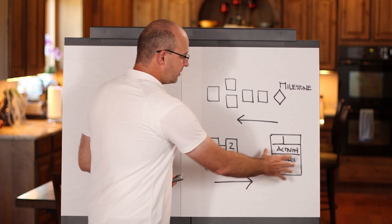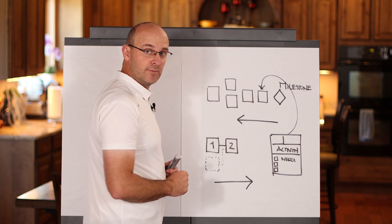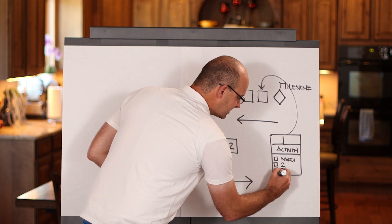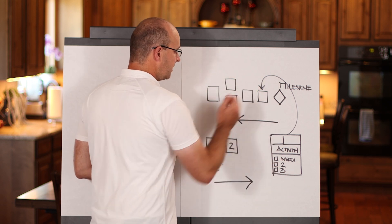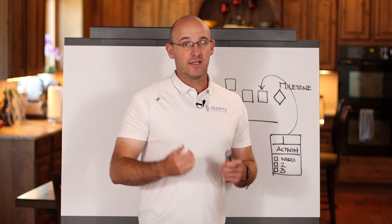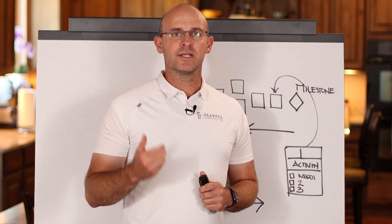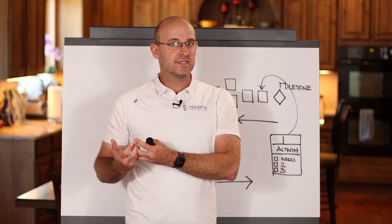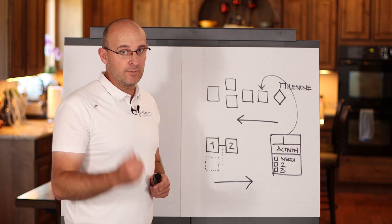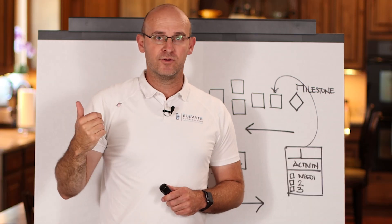So when you put this first sticky up, then you ask for the other activities as a part of the sequence to be populated on the board based on those needs. So when you do this, and you start out with this first activity, and you say, in order for this to happen, I need this. Well, then you put that up on the board. Also for this activity to happen, I need this. Let's put that up here on the board. It populates the sequence in the reverse to where we capture all of the needed activities that are a requirement for that one to take place. And so when you run it backwards, by way of a pull plan, not only are you using lean methodologies, and only doing things when it's ready, but you're getting a more complete sequence, because you're doing it not based on sequence number, but based on need in the reverse. That's why you're moving it in the reverse.